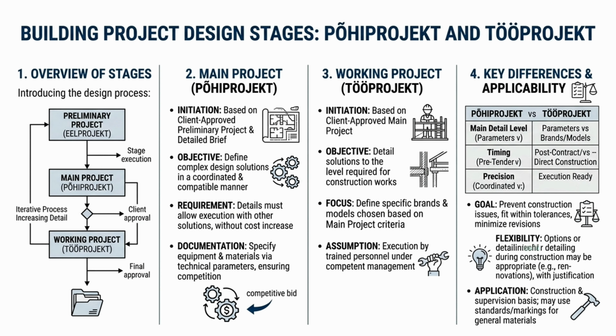It is recognized that in certain cases like renovation or reconstruction, not every detail can be finalized in advance, and some design elements need to be further defined during the construction phase. In those situations, any necessary clarification must be highlighted along with the reasons.